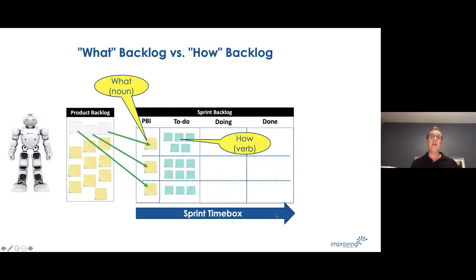If you get all the right stakeholders in the room and they can represent the external stakeholders' needs effectively, you ought to be able to build a pretty robust product backlog in less than a day. Most of the teams I've coached on pretty large projects over the last couple of years, backlogs are developed in less than half a day, but then we continue to refine it. And I'll show that on the timeline when we go along.